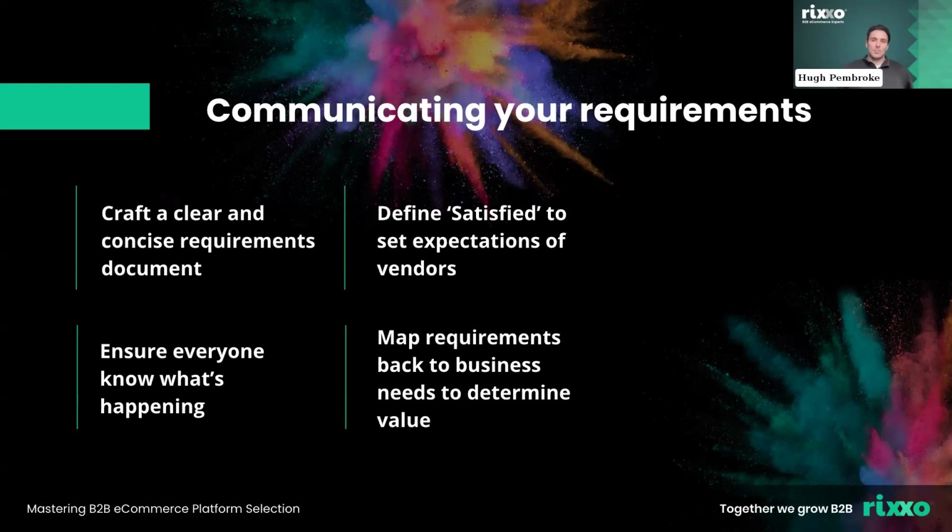A thing that's often missed as part of this is that clients or people that have engaged us haven't included a project charter. And it's really important to include your project charter to make sure that there's an understanding of the overarching vision and goals for the project. And I think too often, we jump straight into requirements without providing that context to the tech providers or the agency that's assessing the RFP.